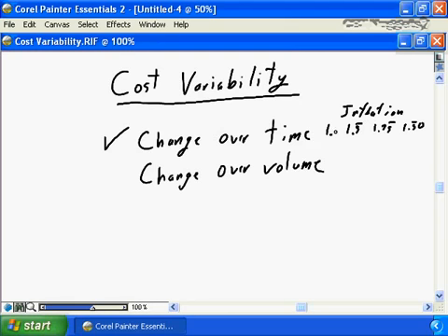Other components often will deflate in costs over time, and technology being a prime example of that. If you need to buy technology, if your project is going to involve buying computers over the life cycle of your project, with the cost curve for computing power, chances are buying computers later in the project life cycle will cost less than buying computers early in the life cycle, simply because the cost curve for computing technology is continually going down, is continually favoring the buyer as opposed to the seller.